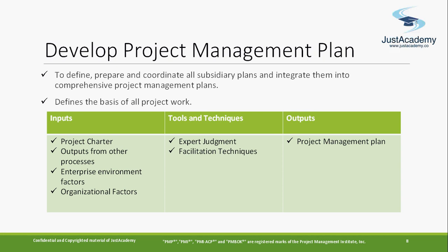So that's the reason, because they don't do it at this stage. In software, normally when you're creating a project management plan, the project manager goes and takes the opinion. He can't write on his own that this will take 1 month or 2 months. Normally he takes the opinion from his team lead, not from every team member. Normally it's from a functional lead or team lead or BA lead. Hey, what do you think about it? How much time will it take to go ahead with that?